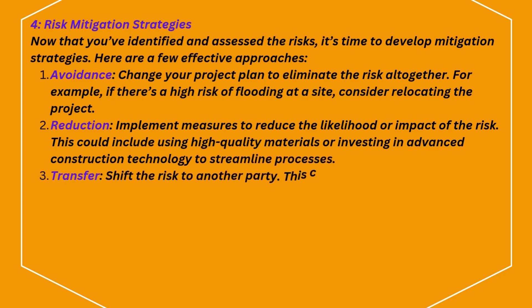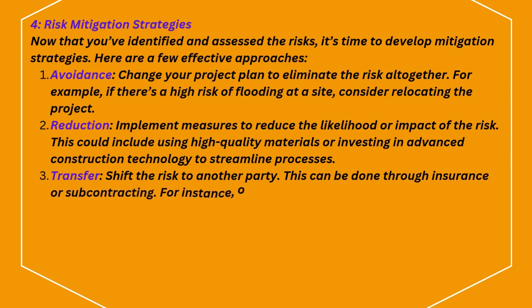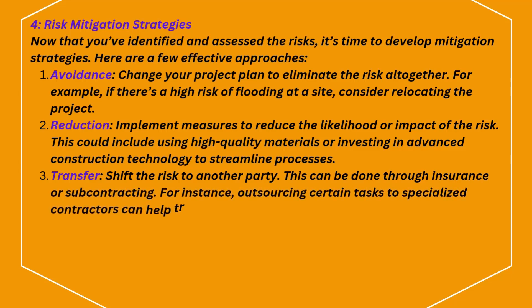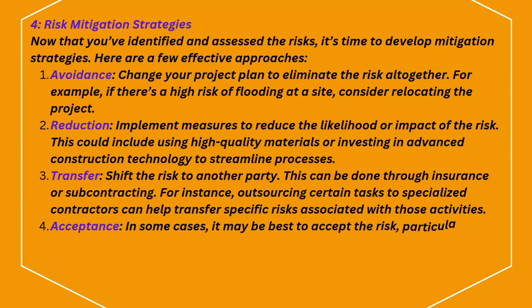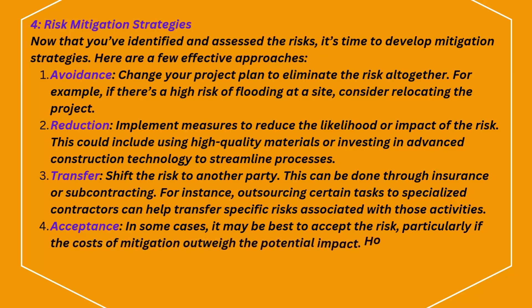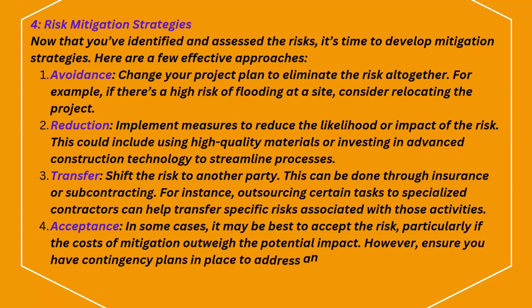Third, transfer: shift the risk to another party. This can be done through insurance or subcontracting. For instance, outsourcing certain tasks to specialized contractors can help transfer specific risks associated with those activities. Fourth, acceptance: in some cases, it may be best to accept the risk, particularly if the costs of mitigation outweigh the potential impact. However, ensure you have contingency plans in place to address any issues that may arise.